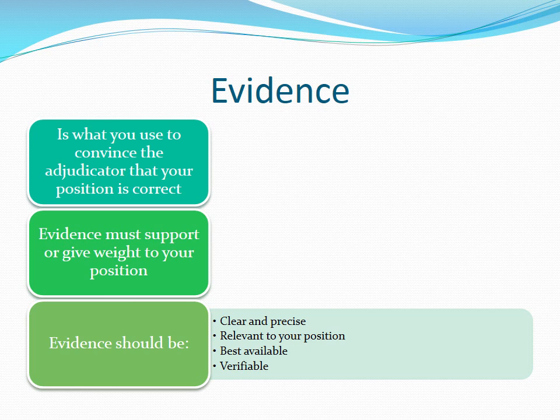Evidence does not always prove something absolutely, but indicates that what you are saying is more likely true than not. An example would be if you claim something was agreed orally and the respondent says they didn't agree. This would be a classic he said, she said, and by itself of little evidential value. If you have sent the respondent an email soon after the alleged meeting summarizing what the parties had said or agreed to, and the respondent had never refuted your email, even though it is not absolute proof that your claim is true, the adjudicator would be more inclined to believe you than the respondent.